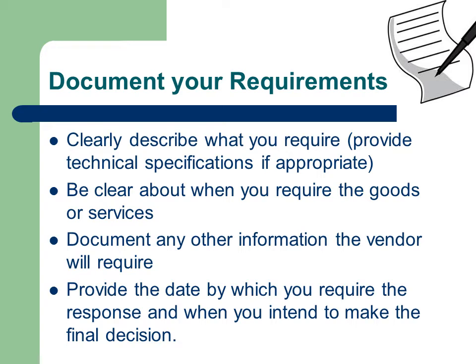It's important that your prospective supplier understands what they are going to provide a quote on, especially if you have requested a fixed price quote. Carefully document every requirement and number these for easy reference later on. You may also need to attach technical specifications if appropriate.